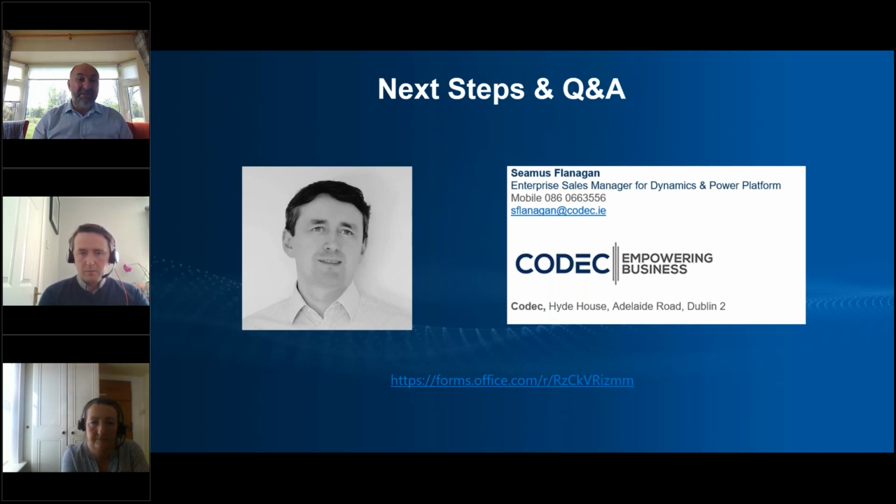In terms of immediately after go live, we provide what we call hypercare post go live support. So that's basically, the project team is still available for that first month end to help you through that period. We then transition to our support team, the same team that delivers projects within Codec handles our support. We don't outsource, or push anything to another party, or to remote resources like that. We deal with support directly.